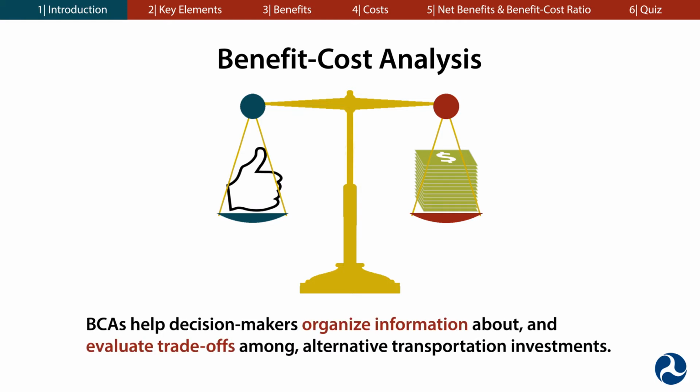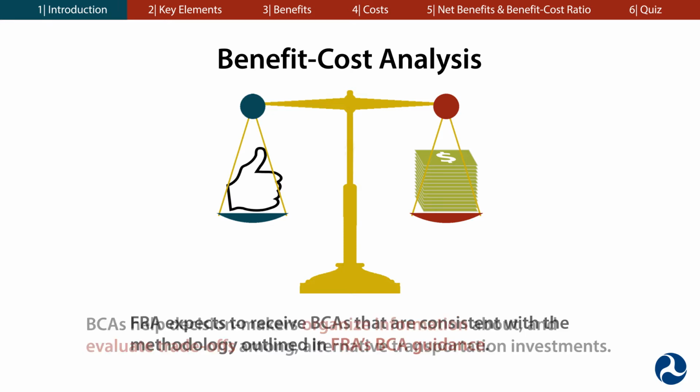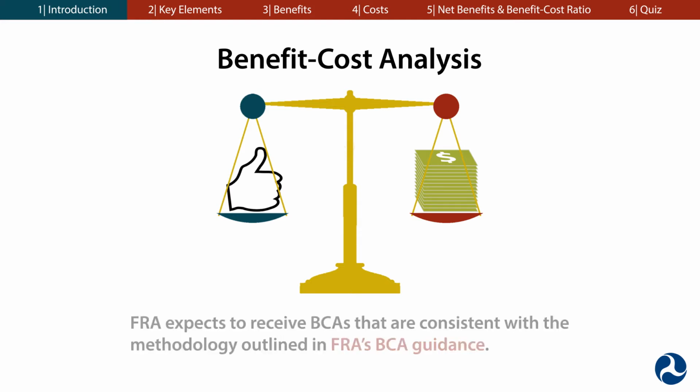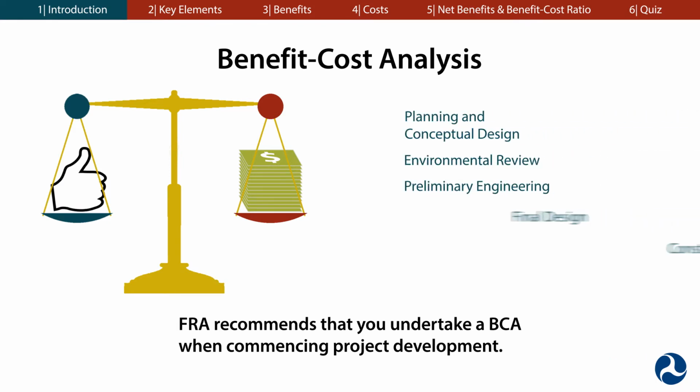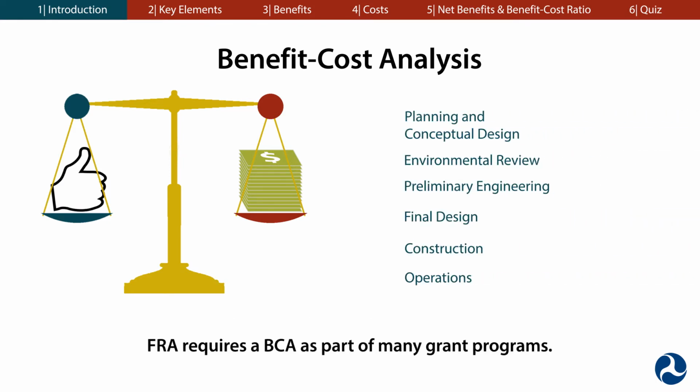BCAs help decision makers organize information about and evaluate trade-offs among alternative transportation investments. FRA expects to receive BCAs that are consistent with the methodology outlined in FRA's BCA guidance as part of the justification for seeking federal funding or financing. FRA recommends that you undertake a BCA when commencing project development. FRA also requires a BCA as part of many grant programs, although specific requirements will be provided in a federal program's Notice of Funding Opportunity.